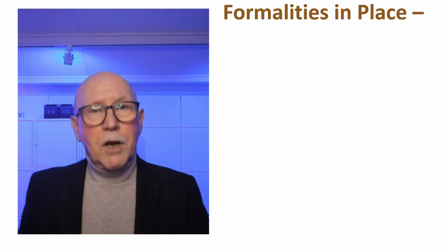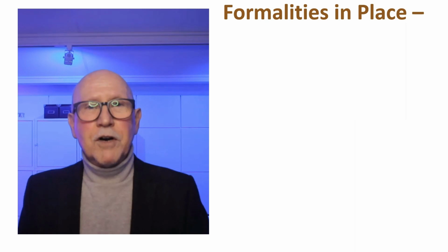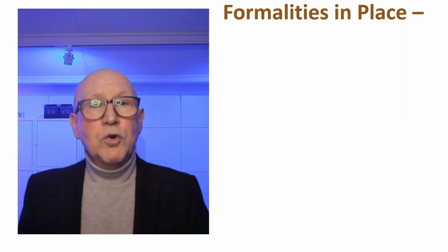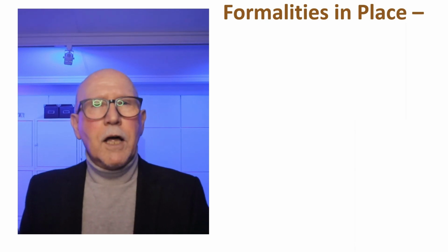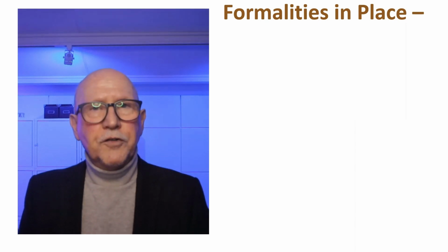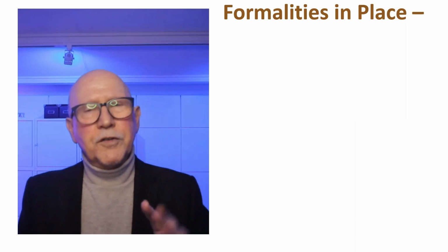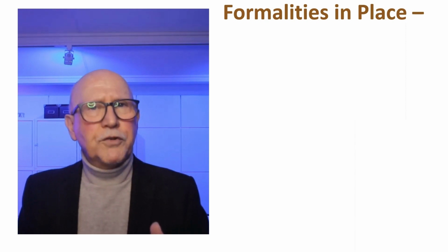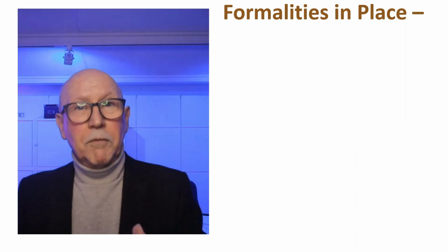So with your client's appointment completed and the project brief in place alongside it to cover the extent of the work, your architect's work that is required, you will then engage on work stage 1 as the first milestone. That will be followed by concept design development, and preparing and making a planning submission. So there's a process there that you're going to follow. With your architect's appointment in place, your client is clear about what to expect from you in terms of your role and responsibilities as the architect stroke lead design consultant.